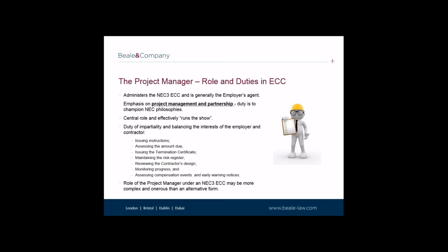That being said, the project manager is not the employer's hatchet man. The employer probably has lawyers for that sort of thing. The project manager is crucial to fostering partnership and to championing the NEC philosophies, such as dealing in the spirit of mutual trust and cooperation between the parties. The project manager plays a central role in administering the engineering and construction contract. We discussed earlier the role of the employer in effectively administering the PSC by assessing compensation events and quotations and notifying defects, etc. Well, under the engineering and construction contract, the project manager deals with those matters.